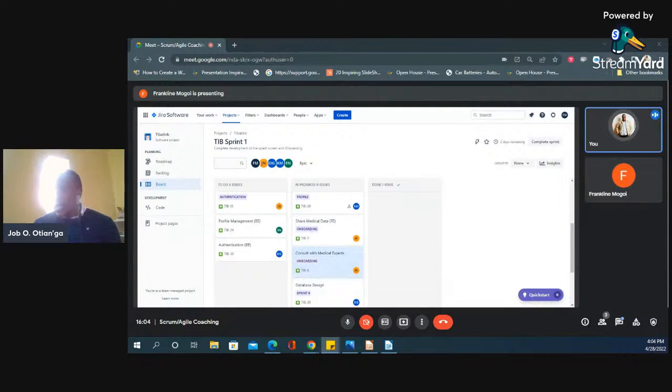The other thing that we need to put out clearly is that we need to define our cadence. Our cadence means that we know we have a 10-day sprint that runs nonstop till we finish everything in the backlog. Within that, we have the daily stand up that everybody has to come to. Then we have the product backlog grooming session, which we know is going to happen on a particular day. We have the sprint planning session on a particular day, and the sprint review session on a particular day. So we all agree on those particular dates.